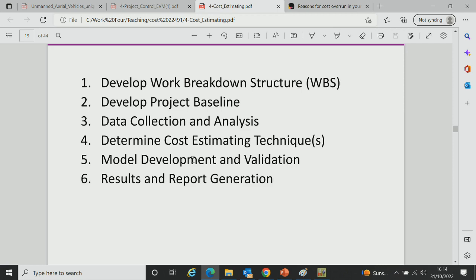So what you would tend to do is have a meeting. You'd have the project manager, you would have the actual part of the project being managed as well, maybe the product manager or the subsystem manager. You would have maybe a stress engineer, asset integrity. You'd all be in the same room, you would have all taken part in the estimating process, and if it was me, I'd be presenting my process, what I did at each stage. I would have the network diagram, the performance measurement baseline, all the data, all the people I'd talked to, the minutes of the meetings, cost data, and cost driver data, maybe from the CAD system, maybe from contractor quotes, maybe from interviews.